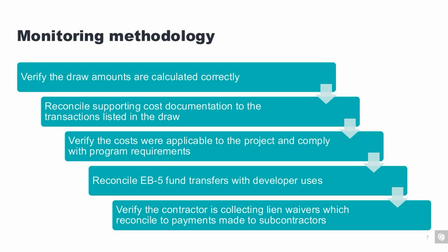Frequently, lien waivers are considered to be a fairly simple control function, and in fact they are, assuming contractors are paying the subcontractors and suppliers on a timely basis, and lien waivers are being supplied and collected. This is a very straightforward process.